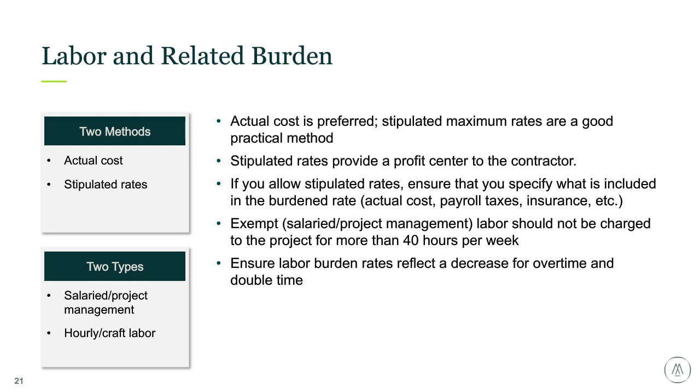Also, another area that is a good discussion item, and making sure that you have this in your contract terms, is on-site versus off-site labor definitions, which can help prevent excessive labor charges to you. This is not in the slide, but this is an area where owners can incur excessive charges, as people may be booking time as they're off-site, driving, thinking about the job site at work, or just in the car jamming out. So making sure that you clearly define that they have to be on site to charge the job is critical.